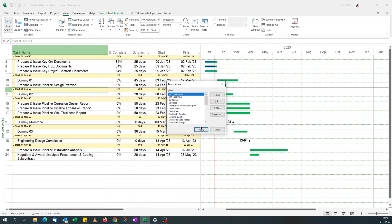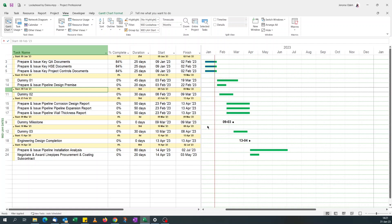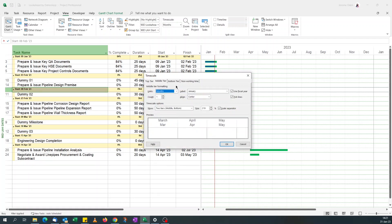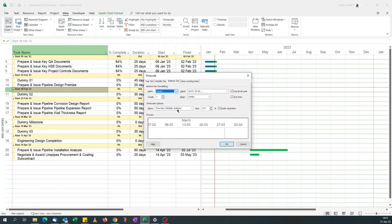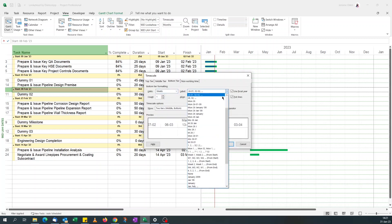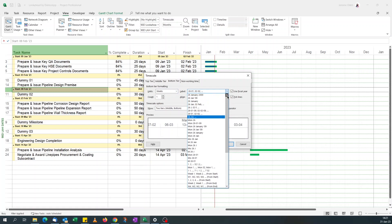It is fine. Close this. Now being a 90-day look ahead, showing the start date is just not enough on the timeline. Maybe the first thing I'll do is change the timeline. Double click on the timeline, the middle tier I change it to months, the bottom tier to weeks. Look for weeks.